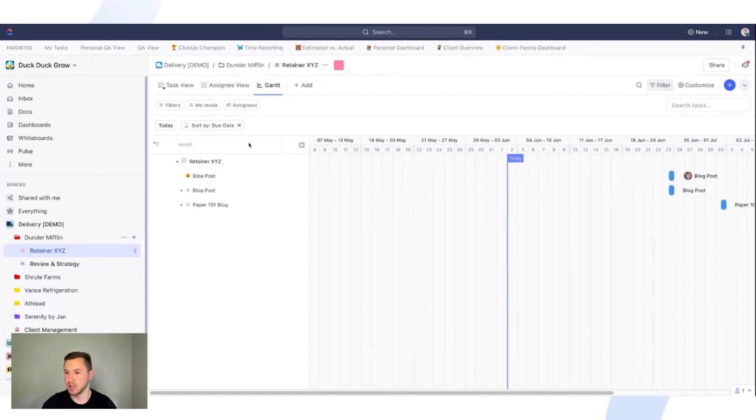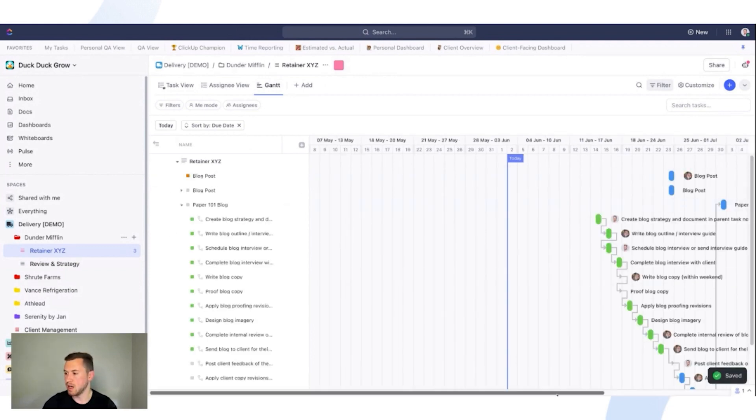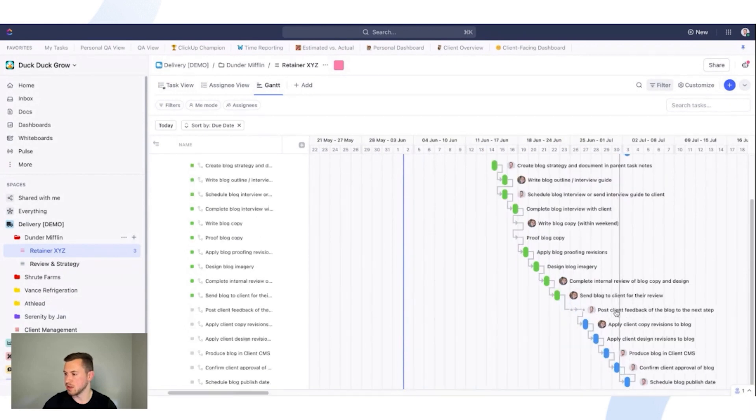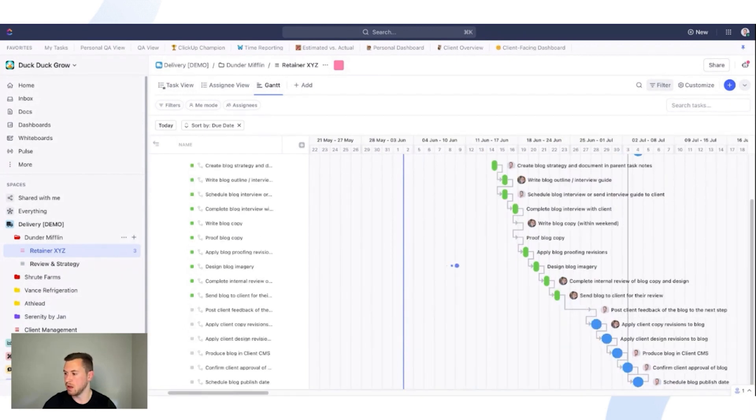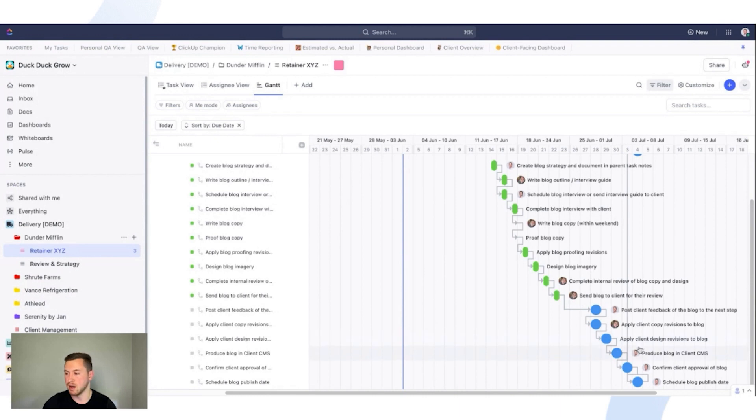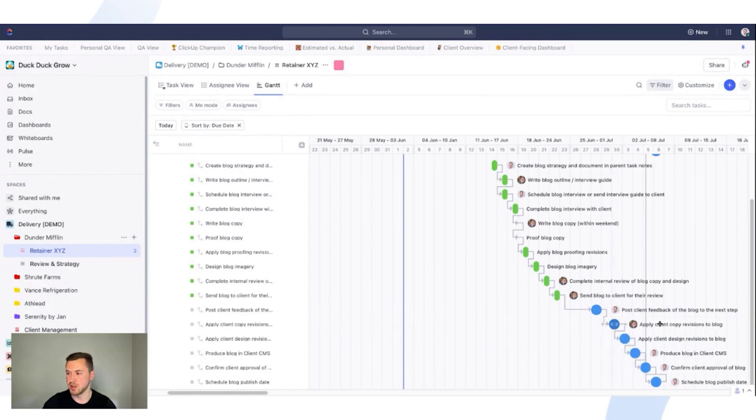So now I can go into the Gantt view just like this. And because I have all my dependencies built out, I can easily remap this task just like this. You'll see everything is going to drag along with it. And now we've officially remapped our task super easily. So that's a massive benefit. If you save all your templates, you have dependencies in there. It's going to make it much easier for you. As you can see, everything below it is going to move with it.